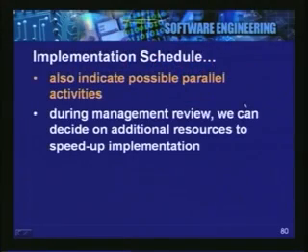We also identify the activities which can be done in parallel. Once this is prepared, we can do a management review to ensure that the project will be completed in time. If we find that the time is not acceptable, then we can actually add additional resources so that the implementation can be speeded up. So, this is possible because we prepare an implementation schedule and analyze it.